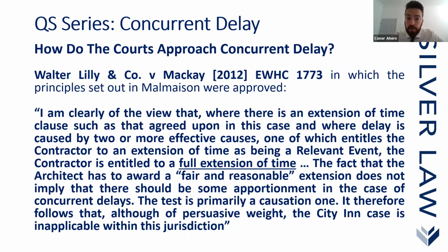This case from 2012 set out the principles in Malmaison and effectively approved the position put forward in Malmaison, when it said: "I'm clearly of the view that where there is an extension of time clause such as that agreed upon in this case, and where delay is caused by two or more effective causes, one of which entitles the contractor to an extension of time as being a relevant event, the contractor is entitled to a full extension of time.